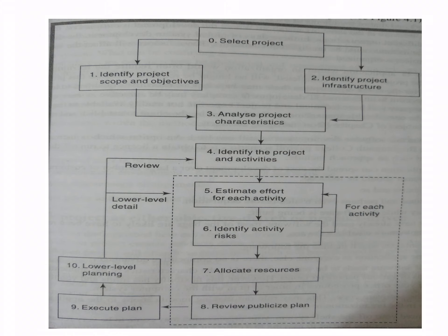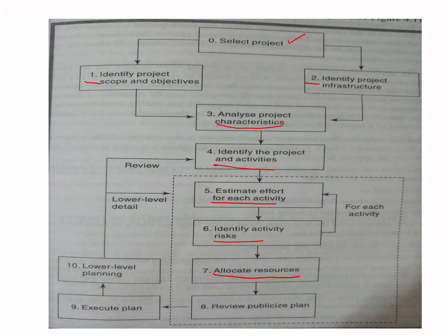This is the flow diagram of the various steps. At the zeroth level you select the project — a company with many projects on hand must choose which one is feasible. Step one: identify project scope and objectives. Step two: identify project infrastructure. Step three: analyze project characteristics. Step four: identify products and activities. Step five: estimate efforts required. Step six: estimate risk, and step seven: allocate the resources accordingly.